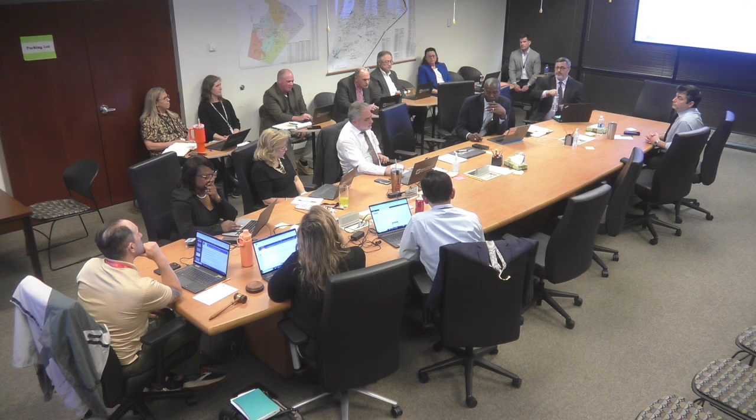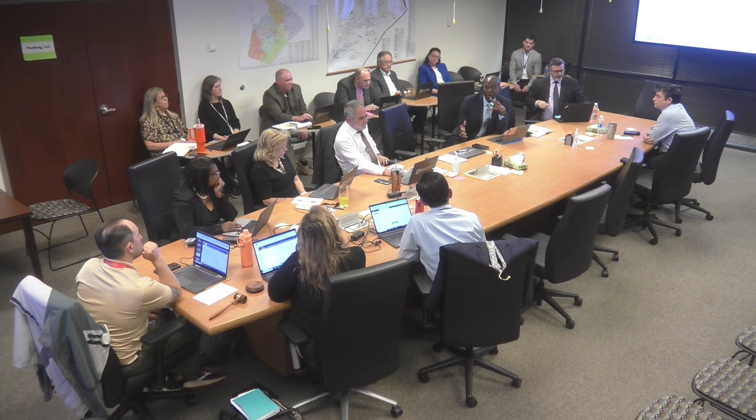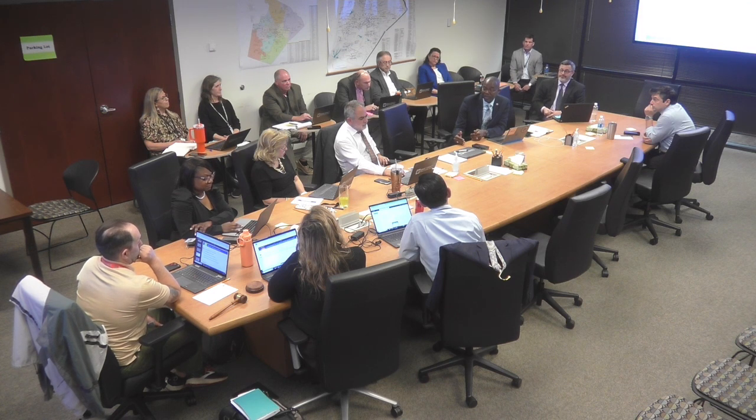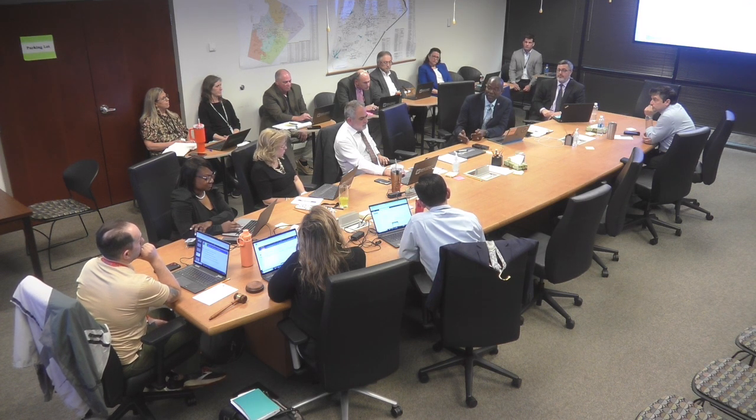Mr. Hershey, what I would say is that I know developing a 25-year plan is good for the community, and that means we need to front-load that by saying that regardless of what we do on a 25-year plan, there is what I would call a usable portion of that plan that really doesn't go beyond 7 to 10 years. But we could certainly take the information and the data that we have now and say, based on the projections that we see, in 25 years we can expect the population to be this.